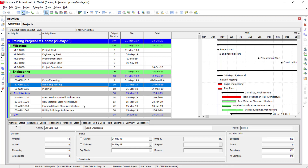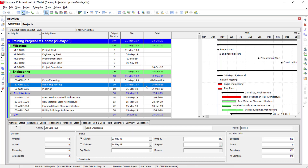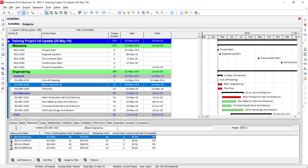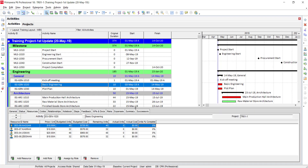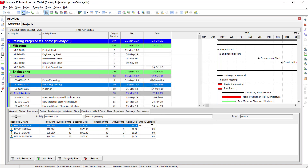We are assuming that Basic Engineering started two days after the planned start. I will go to Status, set it to Started, and select 3rd May as the start date. Then I will go to the Resources tab to enter the progress. For units-based progress, we have two options: either enter the actual units directly, or add a column by right-clicking to get the Unit Percentage Complete column and enter the progress there.